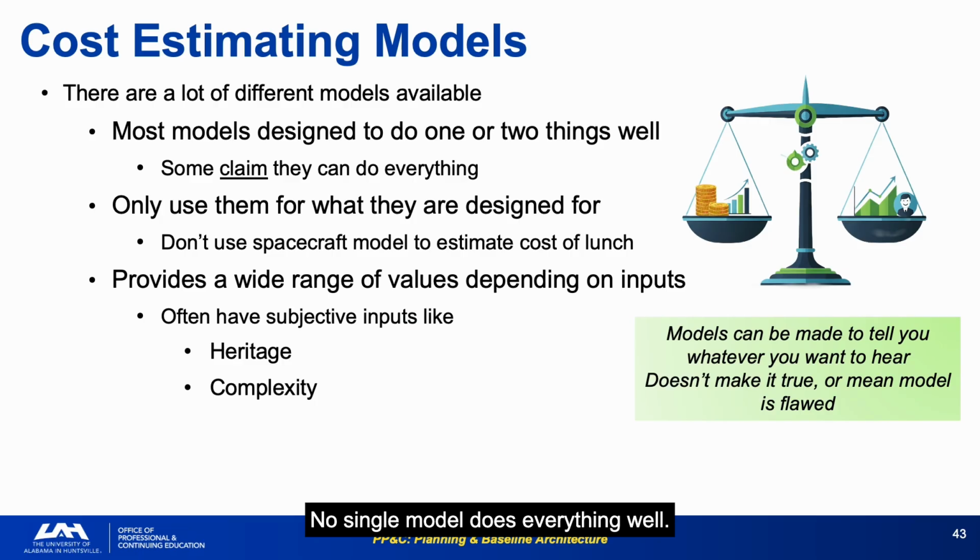No single model does everything well. Different models are optimized for different cost drivers, and using the wrong model for your mission type produces estimates that are misleading in ways that are hard to catch. A good rule: do not use a spacecraft model to estimate the cost of a lunch. The principle applies directly. Use each model only for what it was designed to do, and use multiple models to cross-validate the major cost drivers.